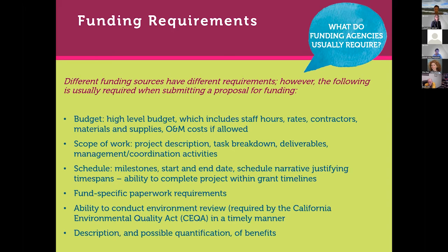It's going to have milestones and dates and schedules, and narratives justifying both the schedules and the budget. Depending on which program, you could have fund-specific paperwork, and then, to various degrees of completion, being able to conduct environmental reviews like CEQA, things like that. And then descriptions of benefits.